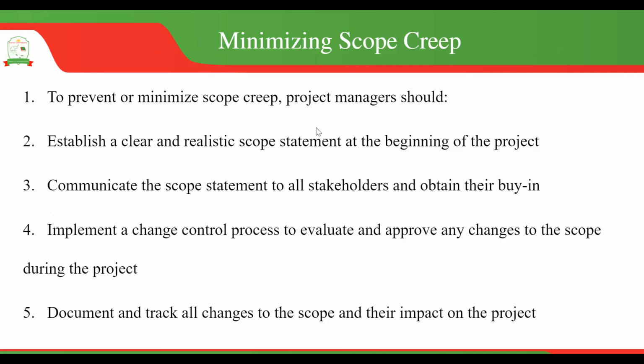So to minimize project scope creep, you need to make sure that you write the project scope statement clearly at the start of the project, and then you communicate the scope statement to all stakeholders.